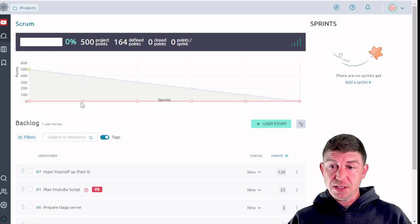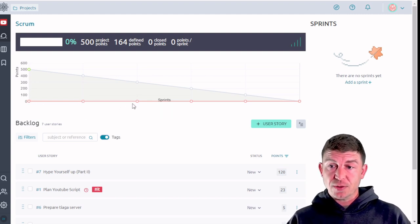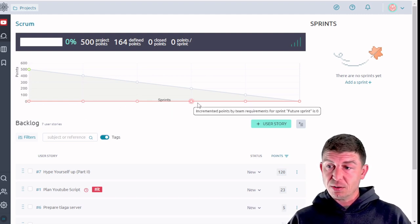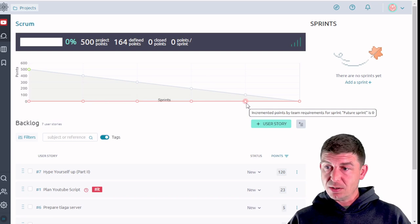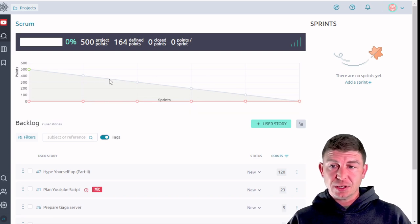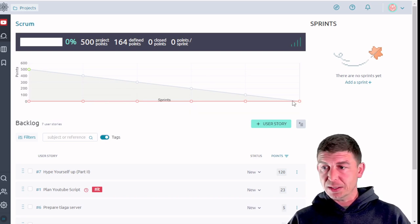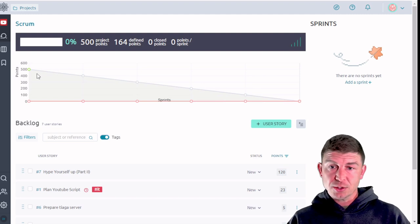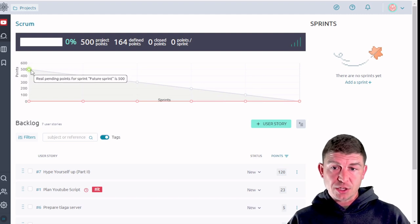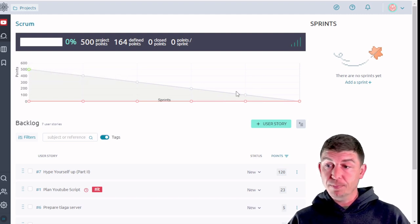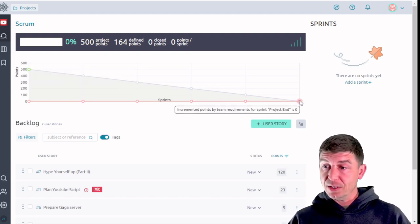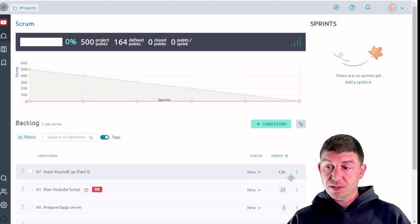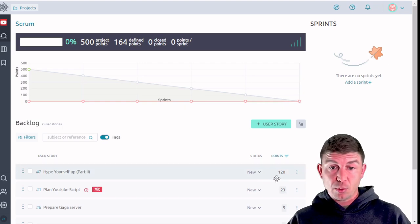As you can see for each of the sprints there's an iteration or a dot on this graph and it shows an expected kind of progress slope. At the beginning of the project we have 500 hours of work to do and at the very end of the project we'll have zero. This is where the story points come in.